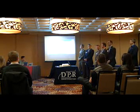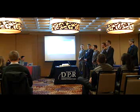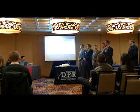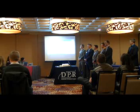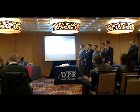Like Brian said, every project contains a little bit of risk. We use three main factors to distinguish the risk of this project. The first being probability of the risk if it was to occur, on a scale of 1 to 100%. Severity of impact if it was to occur, that's on a scale of 1 to 5, 1 being the lowest, 5 being the highest. And risk factor 1 to 5 again, 1 being the lowest, 5 being the highest.